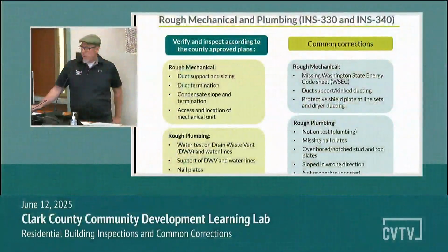So now we're going to go over some of the rough trades. Before we do a framing inspection, we want to make sure all rough trades are completed. And this is important just in case there's been any structural damage. We want to catch this early on. I'm only going to go over 2 of those rough trades, but there are a couple others that we're not mentioning. For example, rough gas or exhaust vents and ducts. But two of the main ones are rough heat mechanical and rough plumbing.